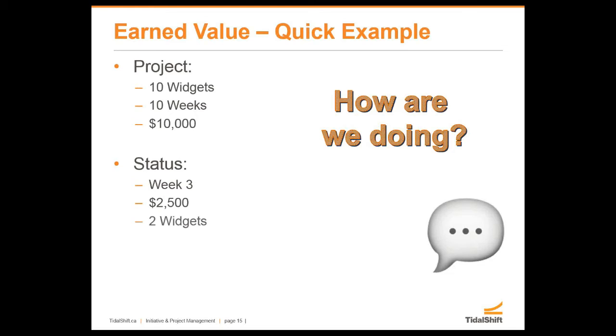Timothy just said, yes, but we have no context, so thank you. When you get this scenario and you say, well, I'm at week 3 and I've only spent $2,500 and I compare that to my S-curve, you have a meaningless comparison. Truly meaningless, because until you know what you've accomplished, you can't figure that out.